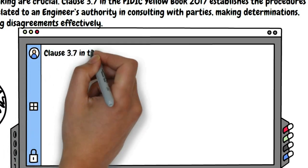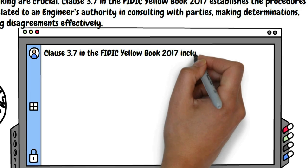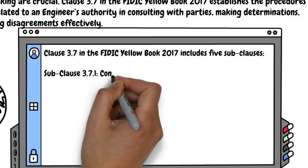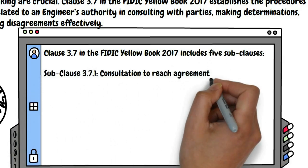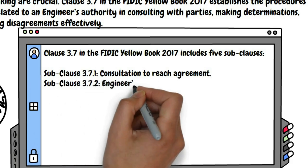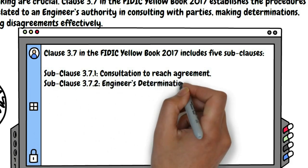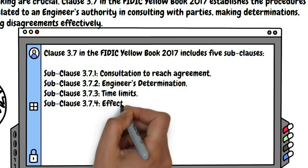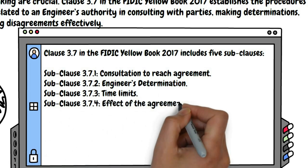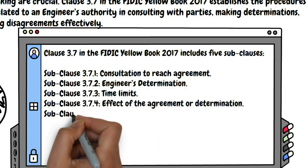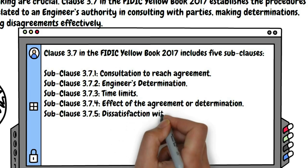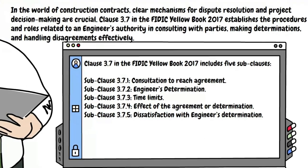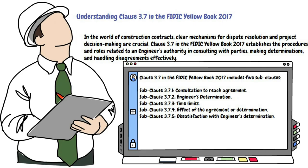Clause 3.7 in the FIDIC Yellow Book 2017 includes five sub-clauses: One, Sub-clause 3.7.1, Consultation to Reach Agreement. Two, Sub-clause 3.7.2, Engineer's Determination. Three, Sub-clause 3.7.3, Time Limits. Four, Sub-clause 3.7.4, Effect of the Agreement or Determination. Five, Sub-clause 3.7.5, Dissatisfaction with Engineer's Determination.